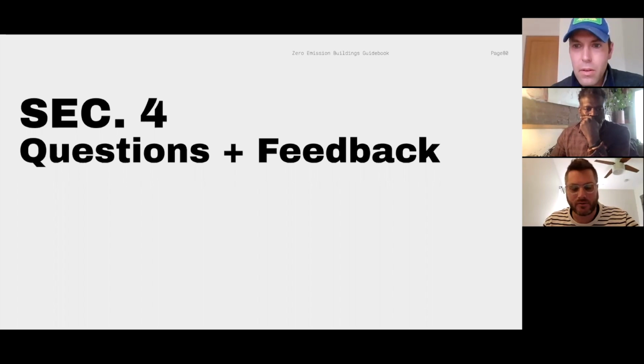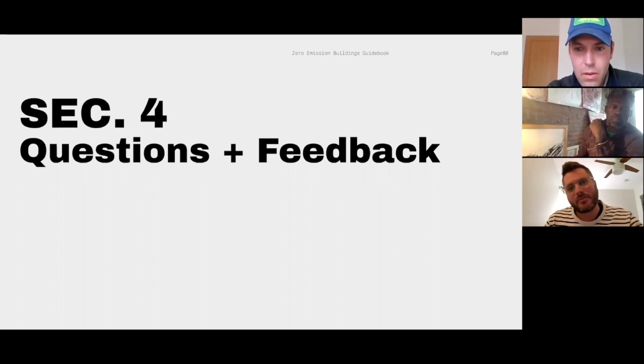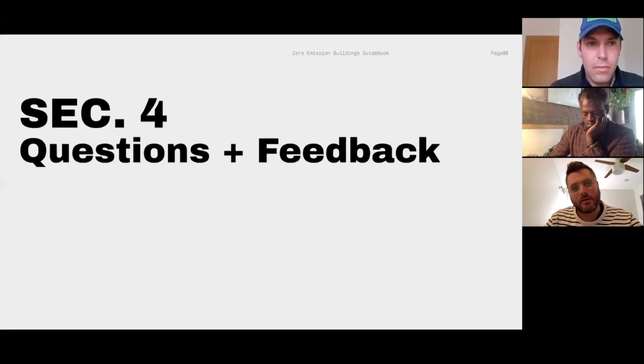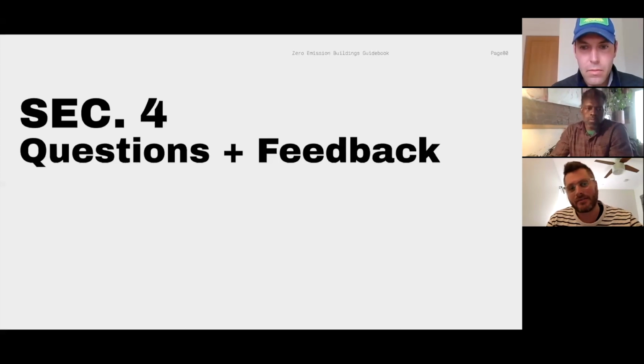Yeah, I think it comes back to best practice and that QA/QC. So having the site lead, or maybe even a specific person on staff, help trace the line of what the air barrier is and make sure that it's met. Another way to do that is to look at testing milestones. So you could do a rough blower door test after you finish your rough inspections, and march through with a smoke stick and get everything that you can there. So you're not relying solely on the final blower door. That's especially true in the smaller typologies, where that's probably less common. In a larger building, it's more common probably in the commissioning. And that's another thing to look at too, the overall commissioning of the systems at the end as well.